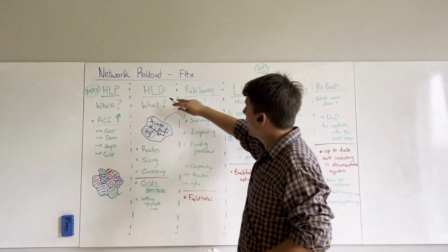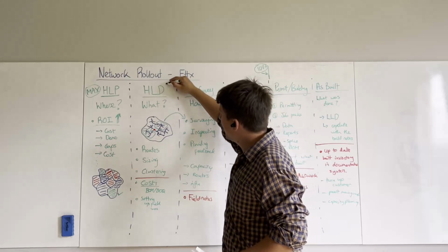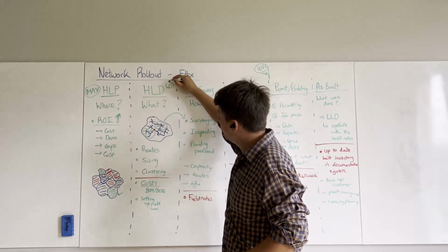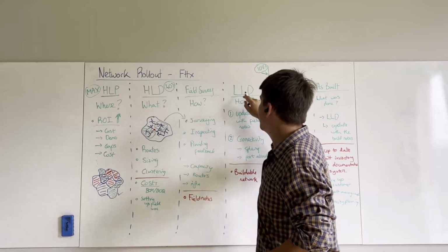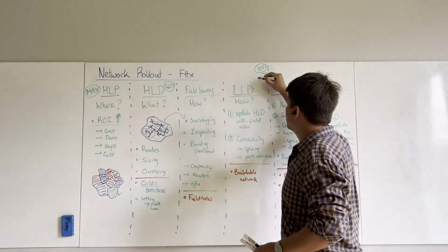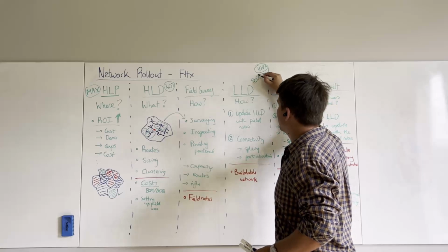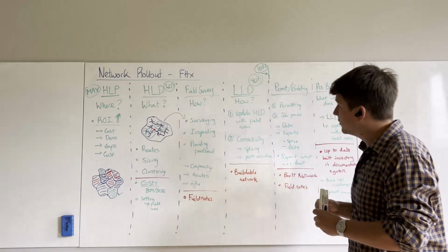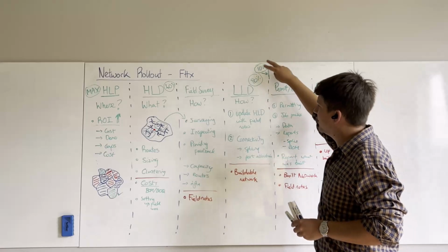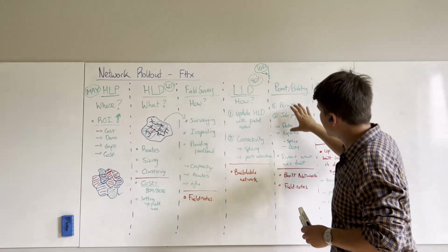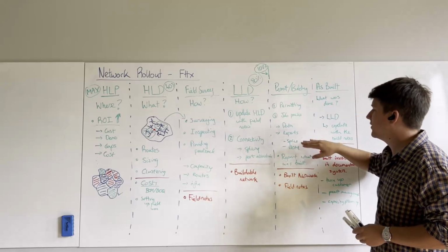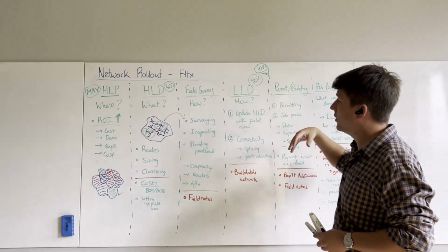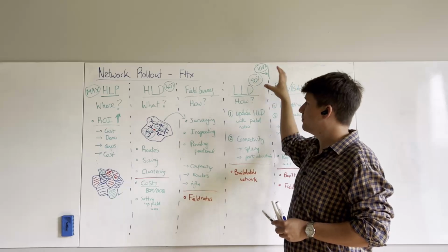And typically through high-level design, we'll maybe get that to sort of 40% ready. Through field surveying and LLD, we'll take that up to probably somewhere around 80%, right? Which is okay, because we know that 20% difference, we can account for that in these outputs, so the bill of materials, etc. You can account for the 20% difference, so you always take out enough materials to actually build it.